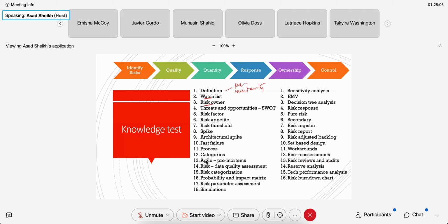So if something goes wrong in your project, and that's part of a problem in your PMP exam, your assumption should be, I'm going to go to my risk register and see what I have to do next to solve this. Not, okay, I'm going to scratch my head and start to figure out the problem. No. The assumption by the Project Management Institute is that you're doing a good job of risk analysis while you're in the planning phase.